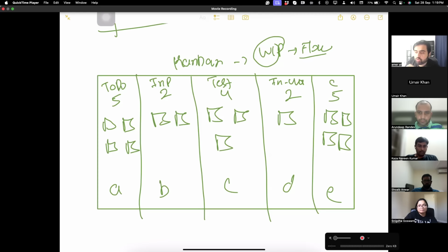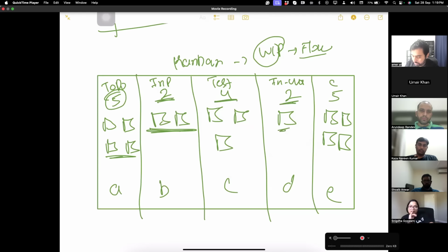No, Sunil, no. Bottleneck is where we cannot do anything more. Here we have five and four are there, still we can do one more. Here two are there, we cannot even move. Here four are there, three is there. Here two or more, one is there. So bottleneck is B, where you are stuck. That is bottleneck. B is stopping the work.